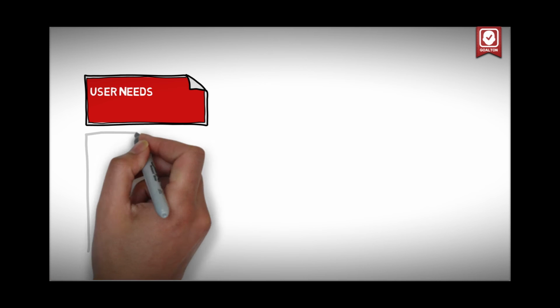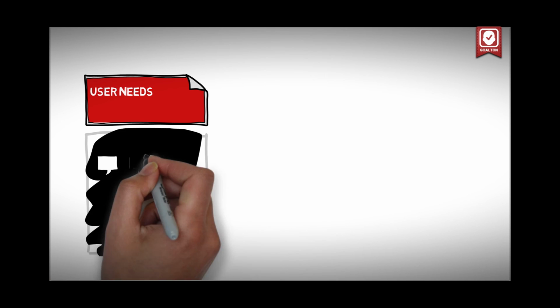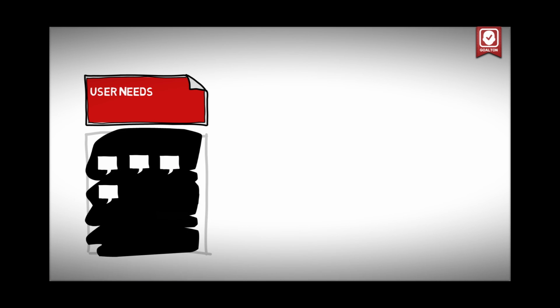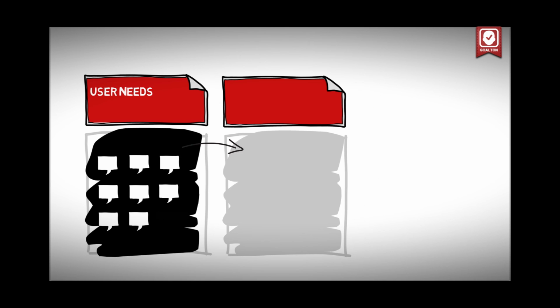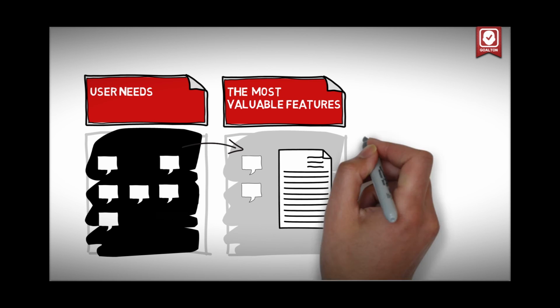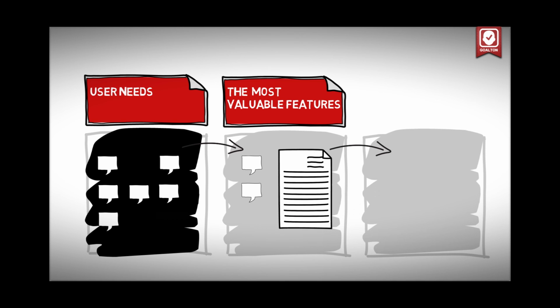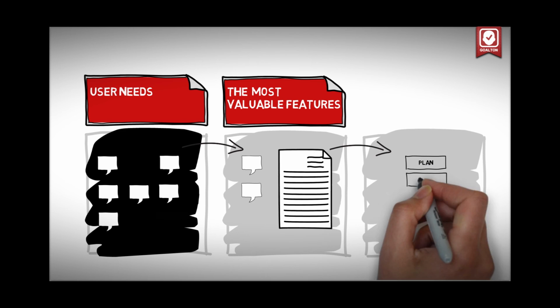In fact, this approach combines the two previous principles. First, make a list of all user needs. After that, make a list of tasks with the highest priority or value, and then implement them alternately, so as to fit in certain time intervals, often called sprints. You may vary the duration of your sprints from 1 day to 1 week, but should fix it for the period of your planning. Next, you can return to the list of user needs and make a review. Repeat this workflow for each sprint.